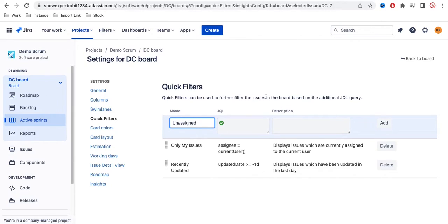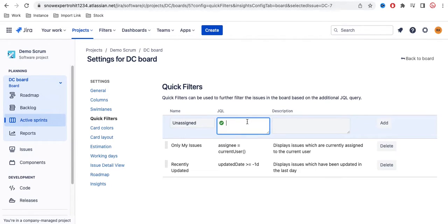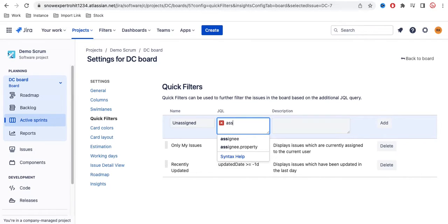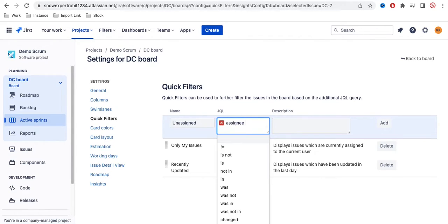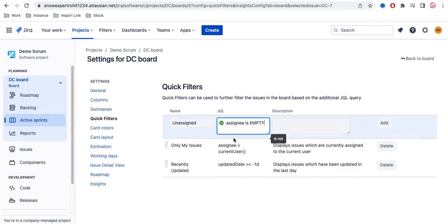And here you need to put the JQL. What is JQL and how we can create the JQL - you can refer to my previous video. So under that we have to put the JQL. The JQL will be 'assignee is empty'.